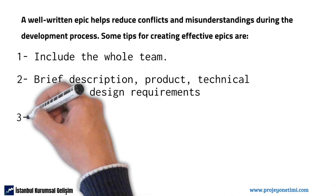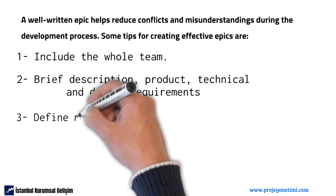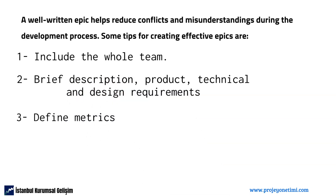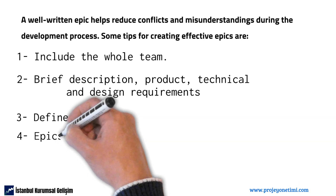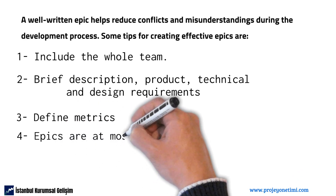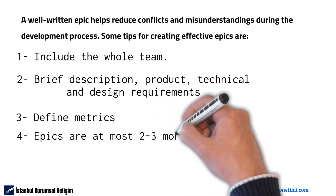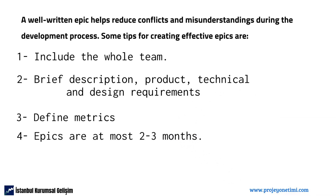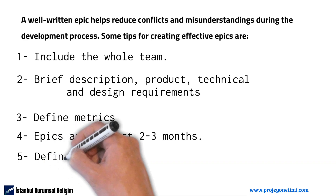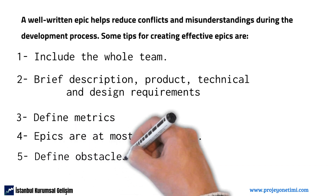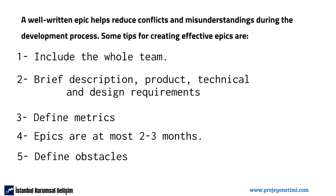3. Determine metrics to measure the success of new features. 4. Make sure the epic will be completed within 2-3 months at most. If longer periods are required, prefer to divide the epics. 5. Identify obstacles in the work process and consult the team's opinion to eliminate them.